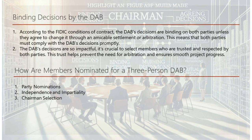For a three-person DAB, each party nominates one member, who must then be approved by the other party. Approvals cannot be unreasonably withheld or delayed. The nominated members should be independent experts who can act impartially and work well within the DAB to make unanimous decisions. If a nominee seems unlikely to strive for unanimity, approval may be withheld.